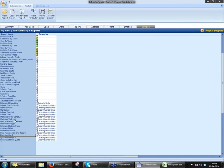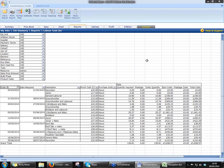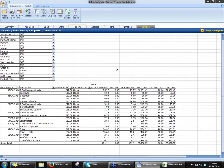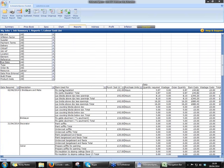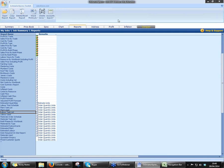You can do the same thing with your labour — just open up the Labour Task List. This is giving you a breakdown of all the different labourers we're going to use on site. What I always suggest: if you've got a site office, why not stick this up in the site office with the Item Used For in there? That way, your trades can come in in the morning, have a look at what they're supposed to be doing on site that day, and effectively project manage themselves. In an ideal world, that would happen — it might not necessarily happen on every job or with all of your trades, but it's just going to help you streamline things and keep things nice and easy.